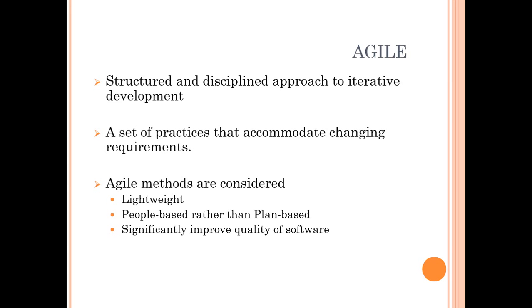But among the best standard practices in agile, maximum companies perform iterations of 2 weeks because it is very comfortable, easy to perform, and easy to produce something more usable, consumable within a given timeline. 1 week is quite short and 4 weeks is quite lengthy. So most people try and go for a 2 week iteration cycle.